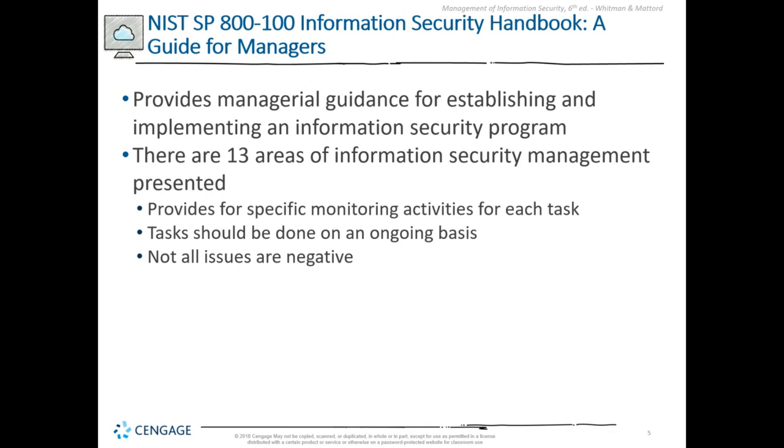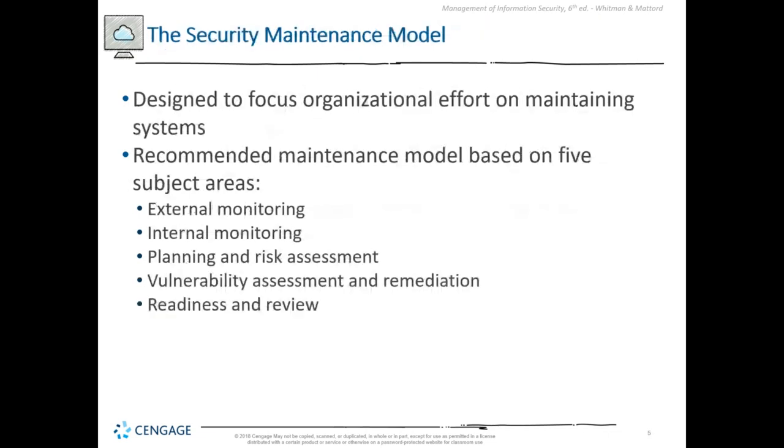The 13th and final area is configuration or change management. This manages the effects of changes in configurations. When you're working through change management, you have 5 steps that you'll go through. First, you'll identify the change. You'll evaluate the change request. You'll have an implementation decision. Then you'll implement the approved change request. And then you want to make sure that you continue monitoring after a change.